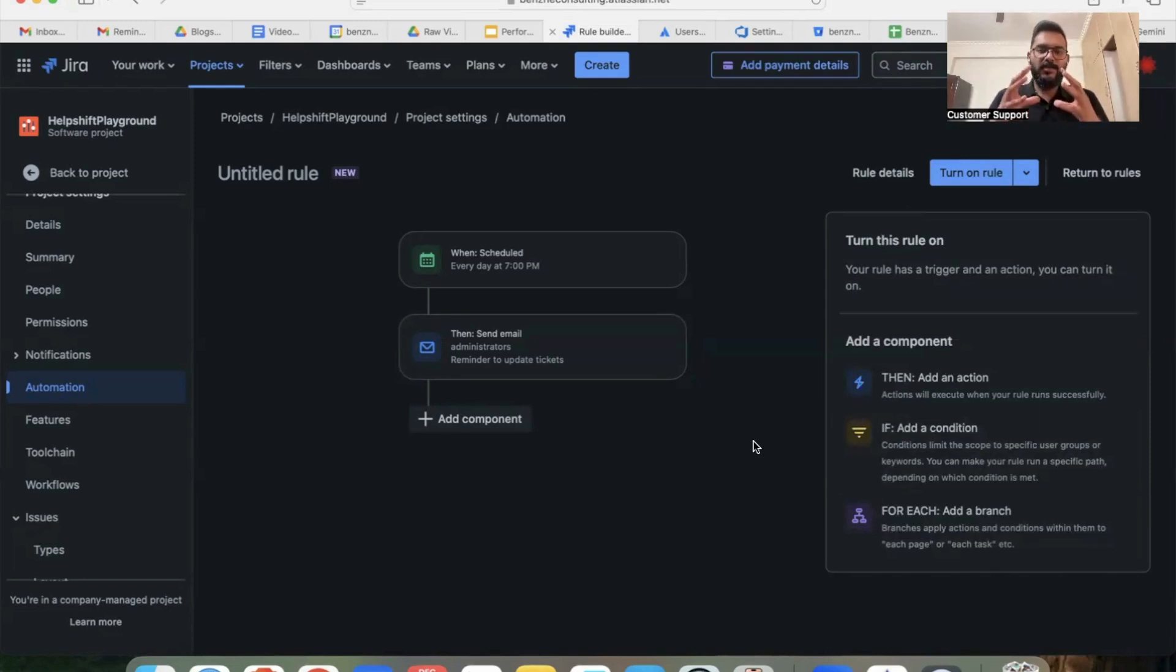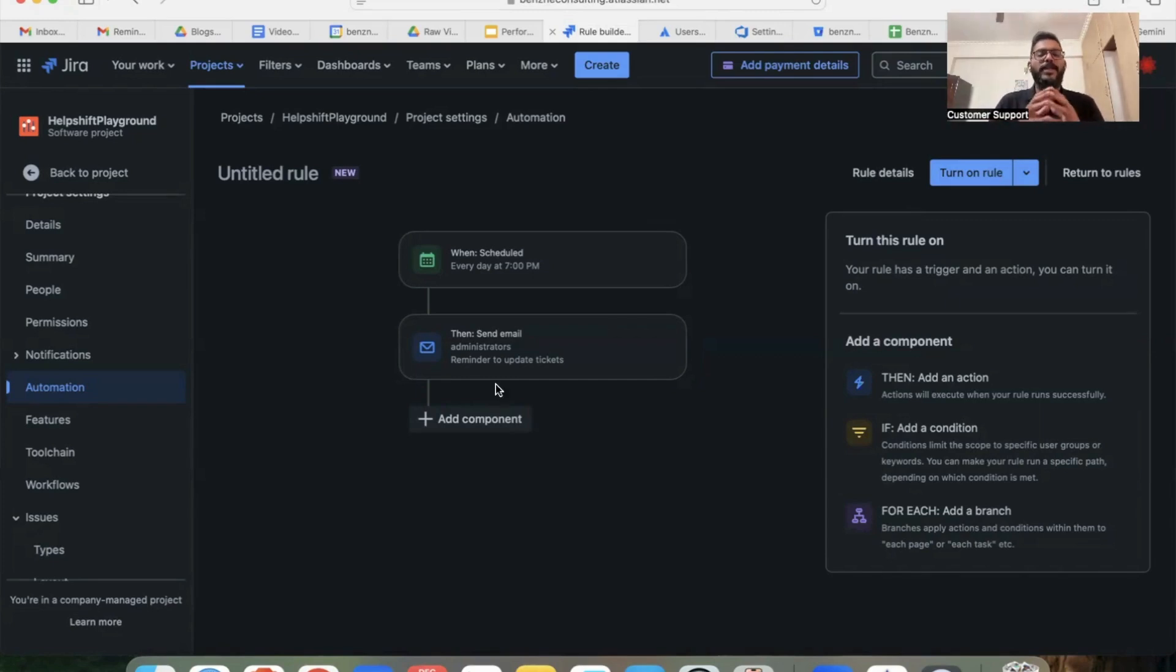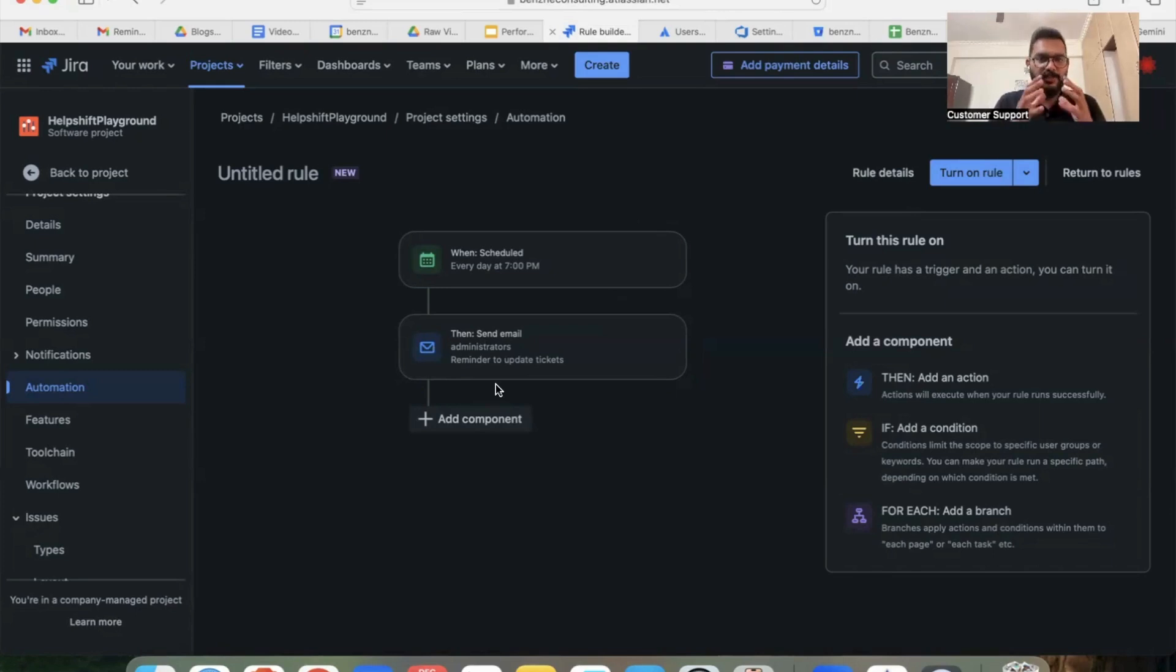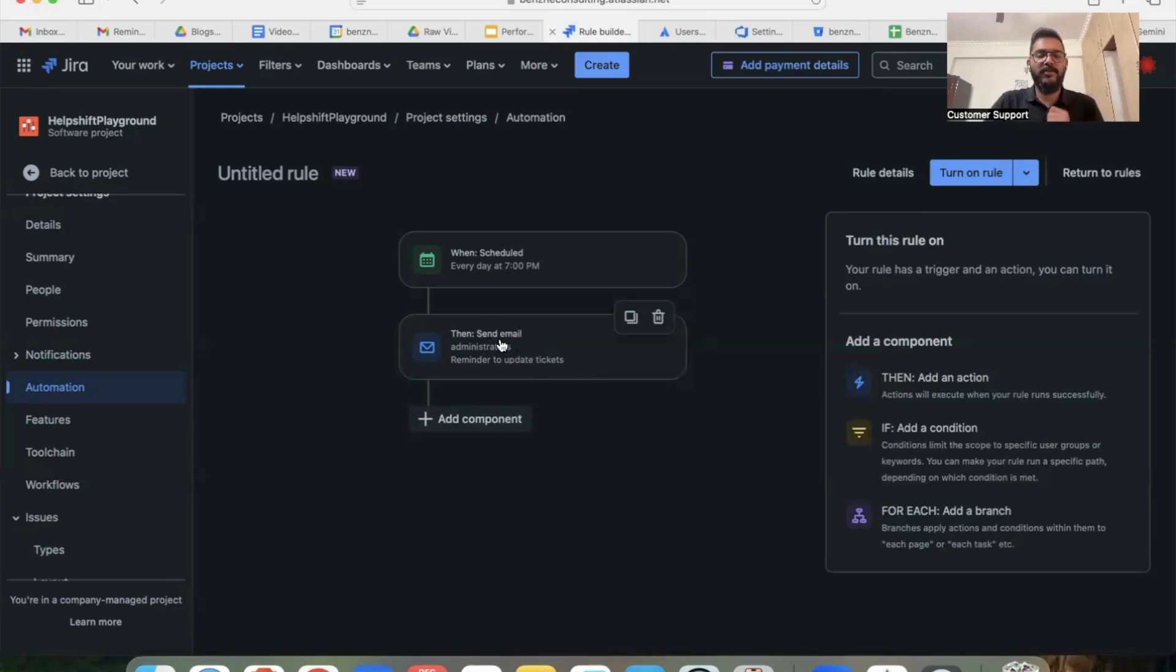What we've done is first we selected a schedule and set up the time and the frequency of the reminders the recipients should get. The next step which is 'then' is to create a template of the email itself. Now with this rule, every day at 7 PM, the recipients who I have added in this 'then' action will get an email reminder to update their tickets in Jira.